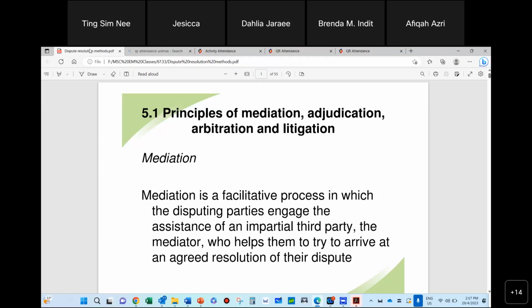With conflict management, it's still the SO, it's still the clients, engineers, it's still people within the same project resolving the dispute. And in all clauses, in all contracts, they will say to refer to your SO, refer to your engineer or your architect, or refer to the contract manager or the project manager to resolve the dispute, to resolve the conflict first. Okay, so any issues that involve conflict will be first handled there. It will be written that it must be solved ASAP, as soon as possible. It must be resolved together with the SO, with the contract manager, with the supervisor, or with the engineer or the architect. So they become the first layer.